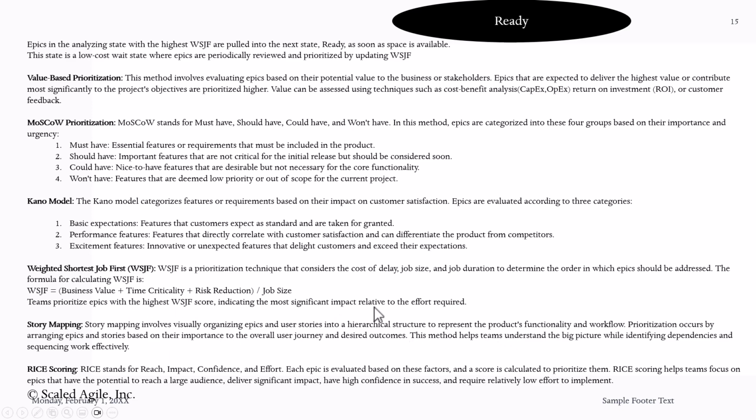When you start doing story mapping, you're breaking the feature down hierarchically, so you can see the dependencies of that specific epic and come up with the risks and dependencies. If it is a very high-risk feature, it has to go on top priority, so you can start working on high risk first. You fail fast, and then you get that feedback, reorganize your team, and implement some of those epics.